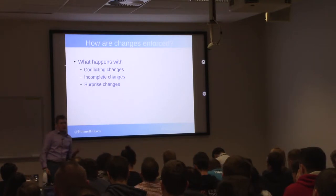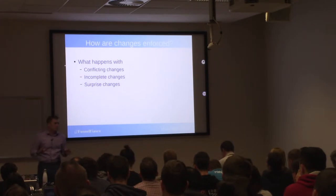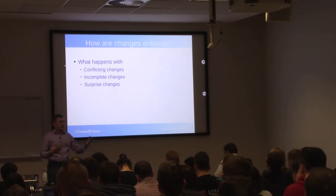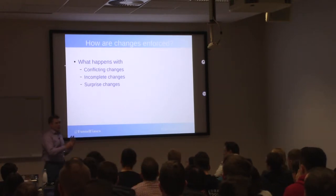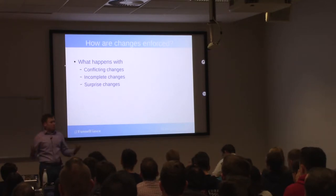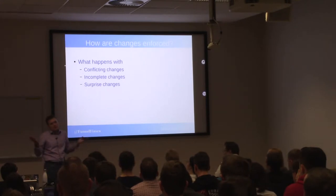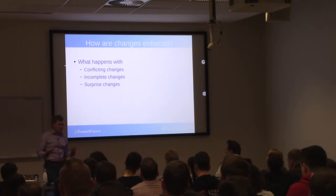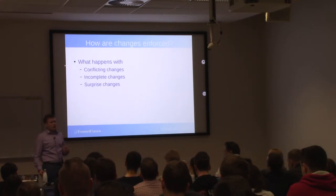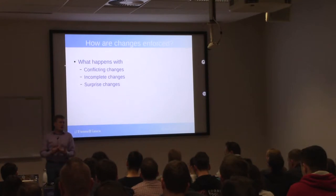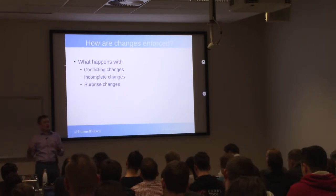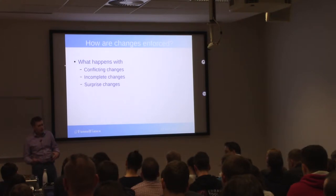You need to think about how changes are enforced. A dirty little program management secret: you can't make people follow the process. People will break the process sometimes. In corporate environments, you can go to their manager. In community projects, you have volunteers — they're going to either go away or just keep not doing it. You need some enforcement mechanism that works for your community. What happens if you have conflicting changes? Alice and Bob both have changes that break each other — somebody has to mediate that. Do you reject them both, pick whoever went first, or have them work it out?